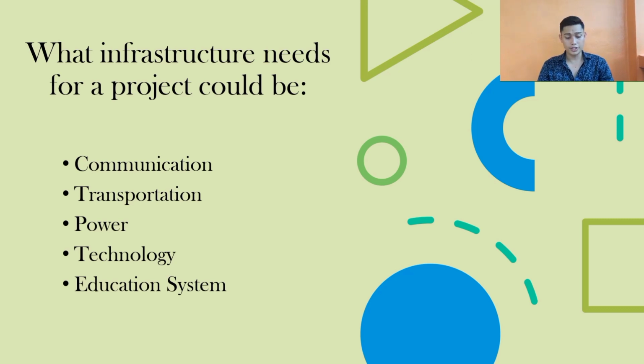Power outages are common in many parts of the world. For example, India's burgeoning economy came to a halt during the 2012 summer when over 670 million people were without power for more than 2 days. If reliable power is not sufficient, other alternatives need to be considered. For example, construction firms often rely on heavy diesel generators as backups on their projects.